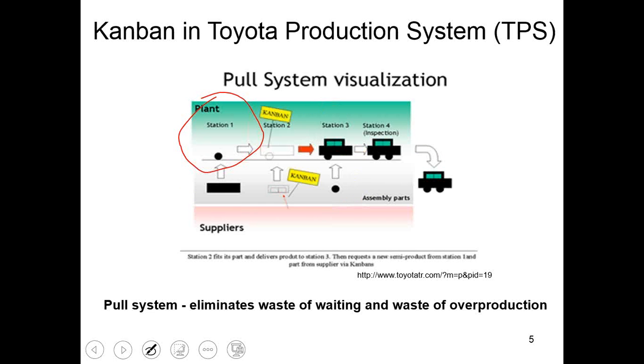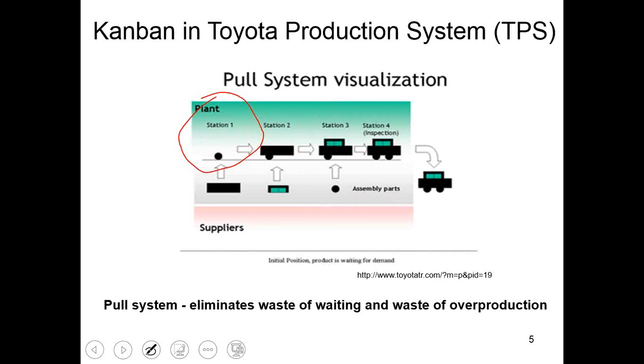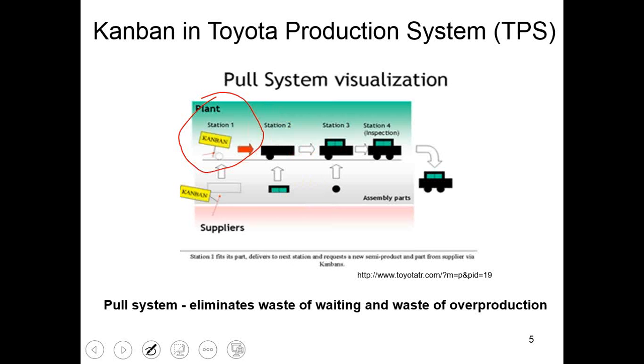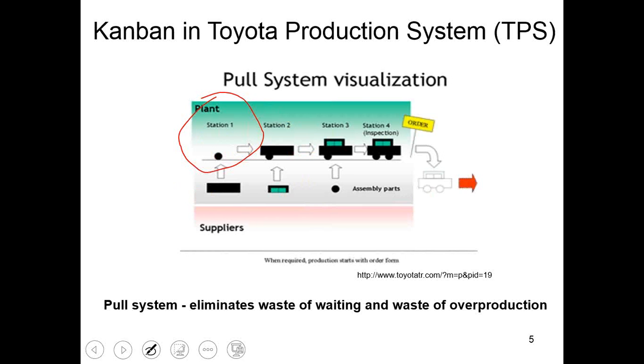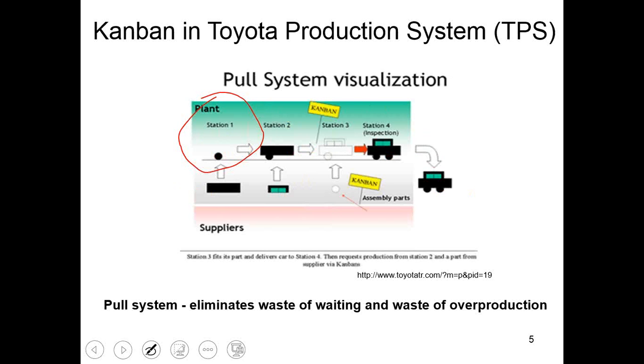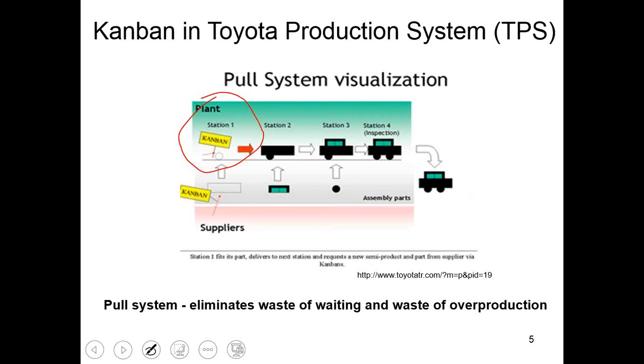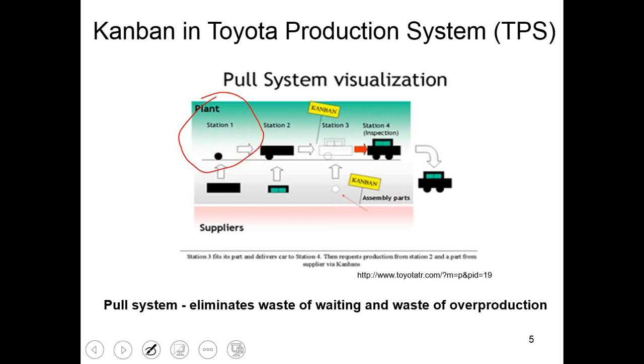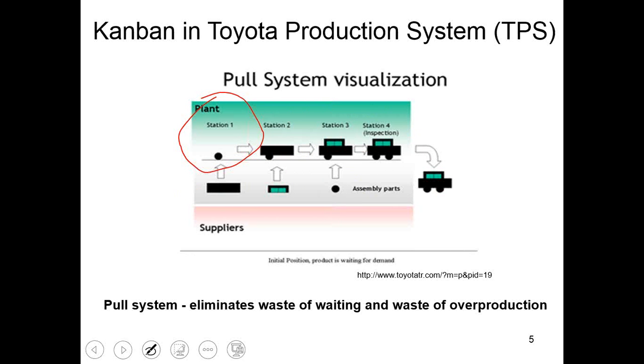if there is a need for inventory, that inventory is decided more from management's understanding of how much inventory is needed there. So what usually happens is that you might produce a lot of inventory for station 1, but at the same time downstream in station 4, you might not have the capacity to build enough cars which need all the inventory that's getting introduced in station 1.